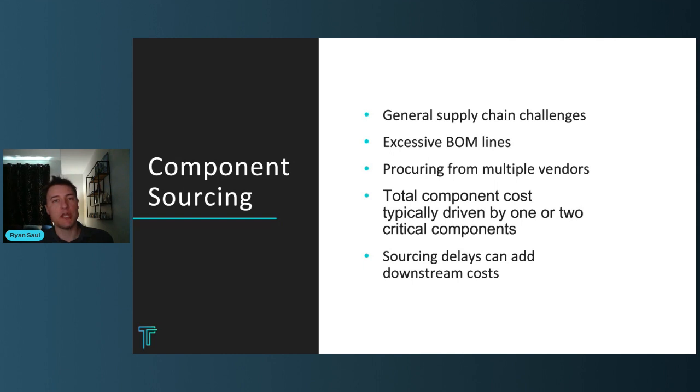And if you make those changes early enough in your design process, you're not going to be stuck behind a scheduling debacle later on. And we see this all the time. I can't count how many times this has happened with our customers. They will decide that they wish they'd used a different component well into engineering validation during NPI. And they have to stop and go back and change the component because it's either no longer available or it's more expensive now than they wanted it to be. So preparing for those situations is a good idea.